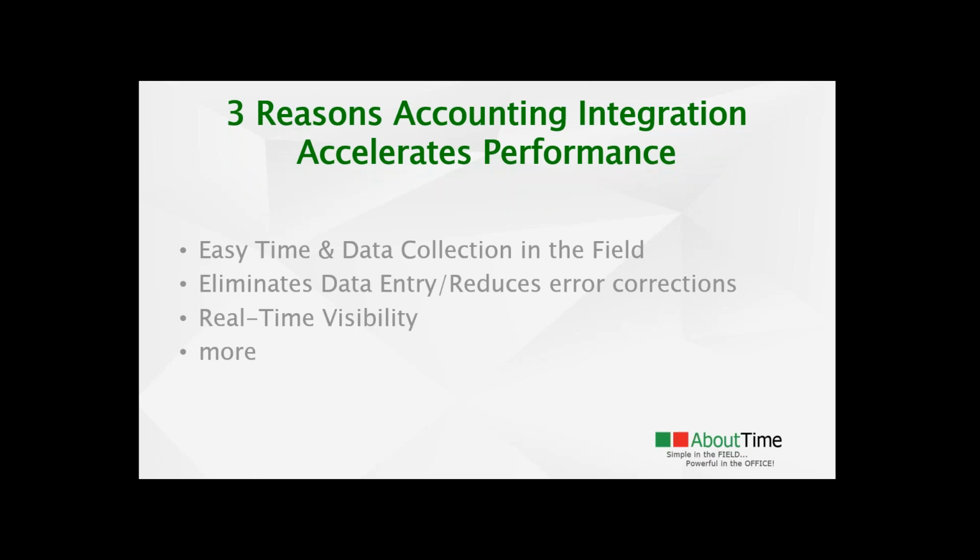Well, if we have a solution that can send out to those devices where they're tracking their time in the field, their cost code structure, their phase structure, the jobs that are pertinent, specific to them, how easy does it make it for them to enter accurate time based upon their day and breaking it out based upon those activities they've done during the day, those tasks that they've done during the day. Some solutions call them tasks, some call them phase codes, some call them cost codes, but those activities they break out for that particular job.